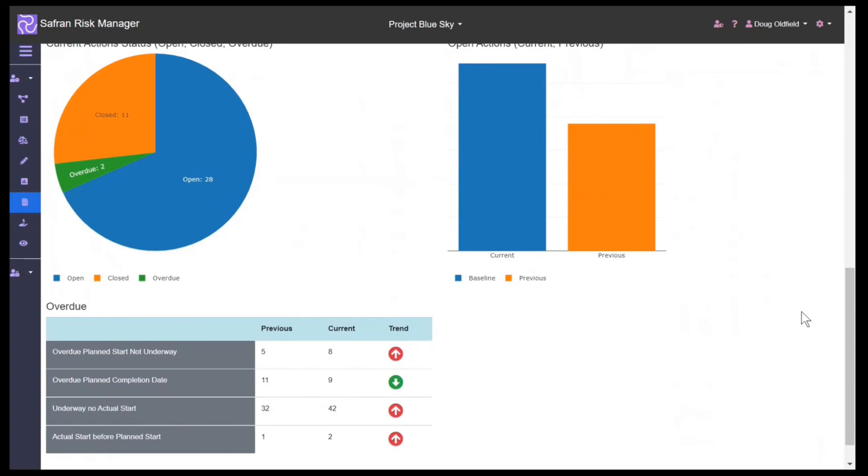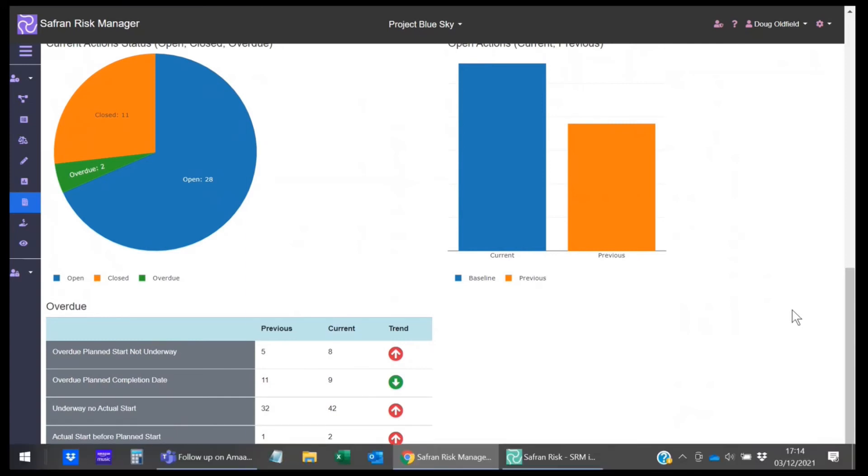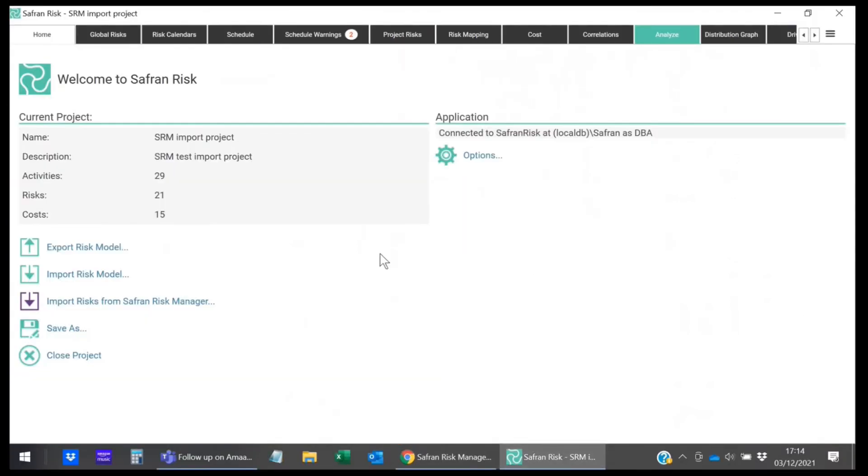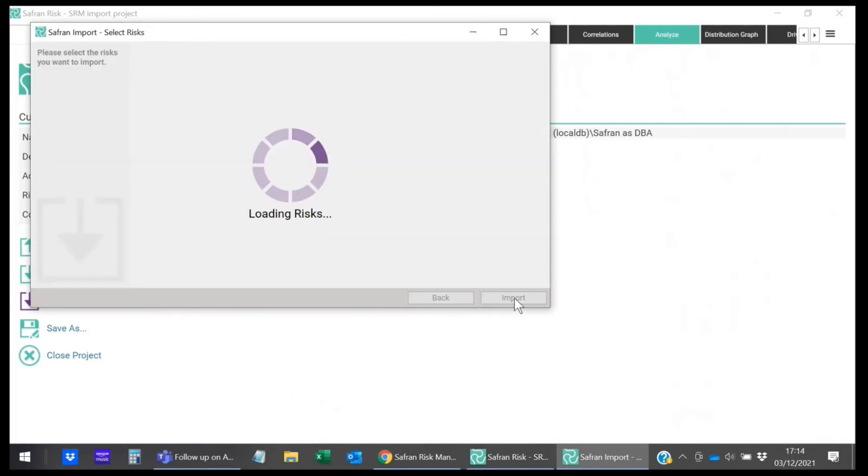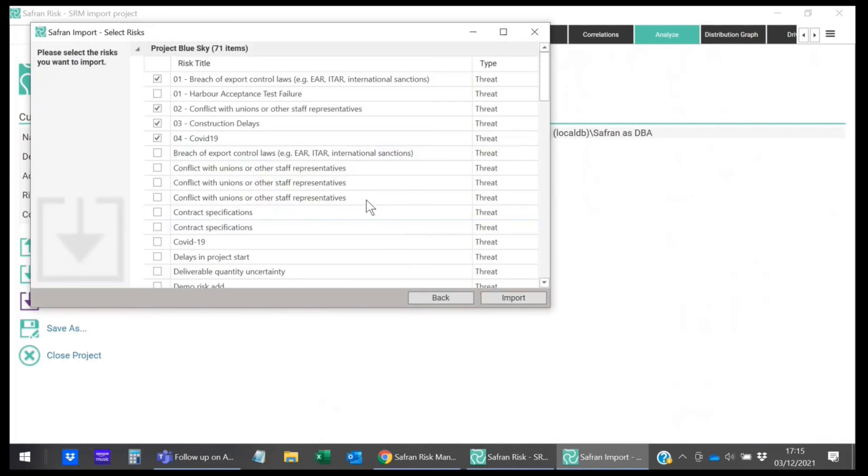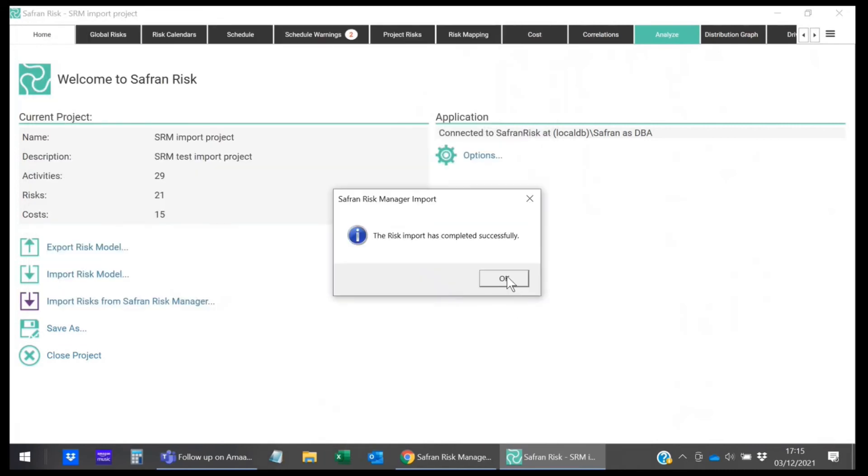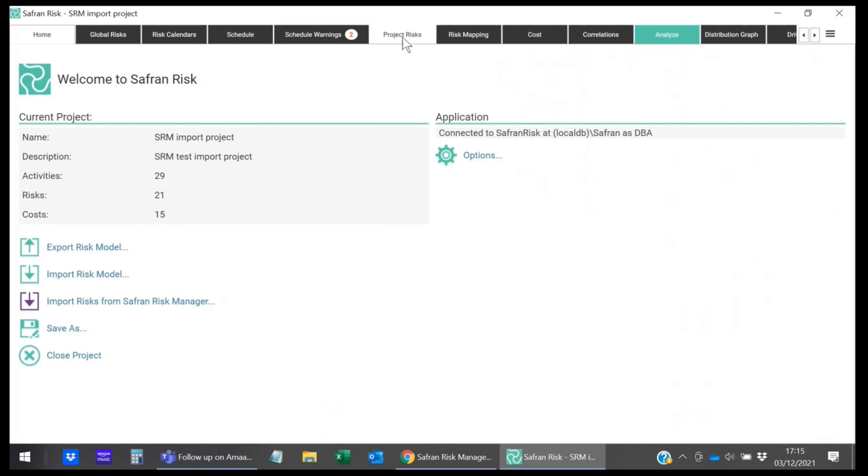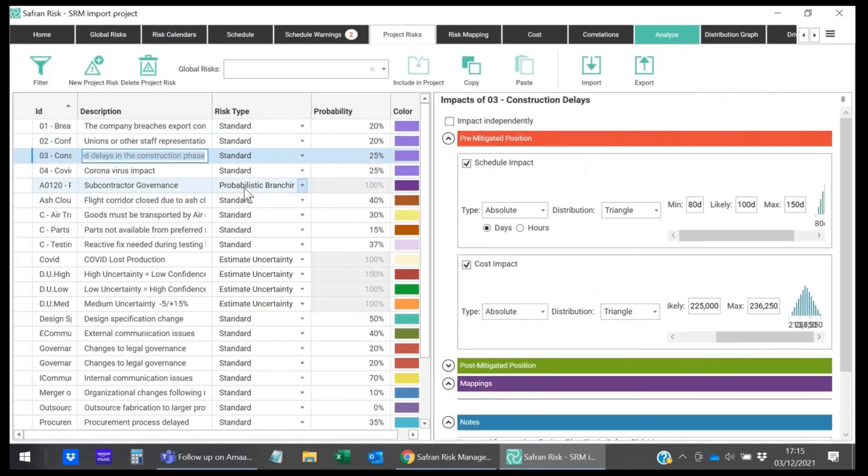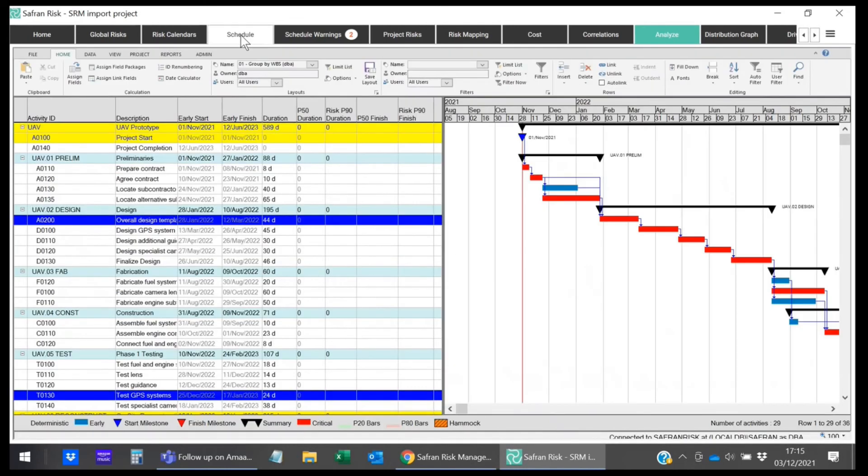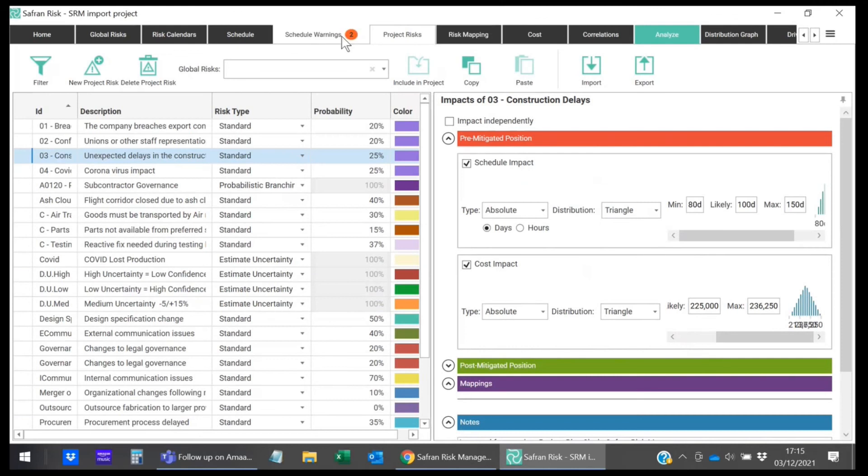Saffran Risk Manager is also fully integrated with our Saffran Risk Companion product for specialized quantitative risk analysis. Here we can choose which risks we want to import from the different projects into Saffran Risk. I can then choose the different risks I want to incorporate, import them, and then I am able to go into my project risk area and apply those risks to any of the activities within my schedule in Saffran Risk, or any of the costs for further analysis.